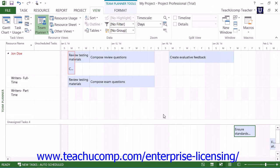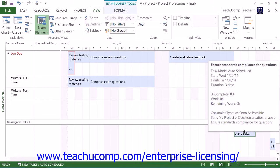In this view, you can simply click and drag the tasks to the various rows within the panes to assign tasks to work resources, schedule tasks, and prevent over allocations.